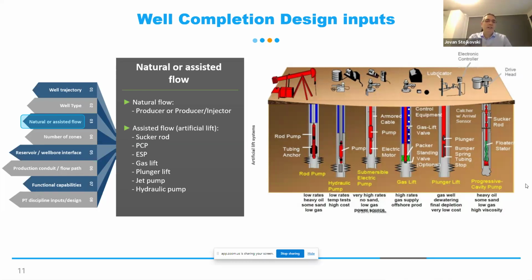Do we have electricity on this drilling pad? Do we need to invest? How much needs to be invested to bring this, and is it feasible to produce the well? Sometimes, for example, we need to build an electricity grid to come to the rig, to the well site where we want to drill the well, which really hurts the economics. And the well needs to produce for several years until it becomes economical.